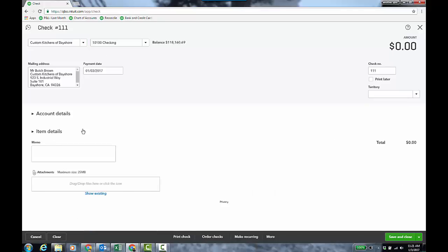And the thing that's nice about a budget to actual in QBO Plus versus estimate to actual in desktop is you'll never get the no item column or the no item row, because as long as the accounts are hit, the same accounts you have on the budget, then when you run the report, you'll see the amounts. I don't have to hit the item that was used on the estimate. Okay, but you can, but you don't really have to. It's not required. I can just look at the accounts if I want.